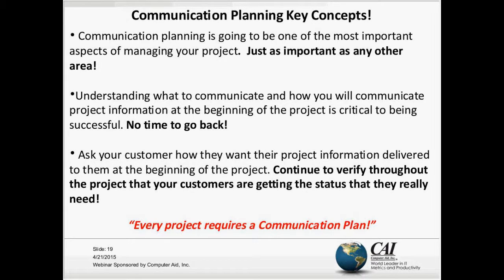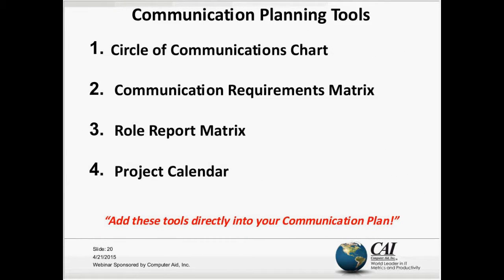Now I want to offer you some tools. When we talk about who, what, where, why, and how, we want to use some tools and insert those into our communication plan. The first is the circle of communications chart — that gives you the 'who.' The second is the communication requirements matrix — that gives you the 'who' and the 'what.' The role report matrix gives you the 'who,' 'what,' and 'when.'